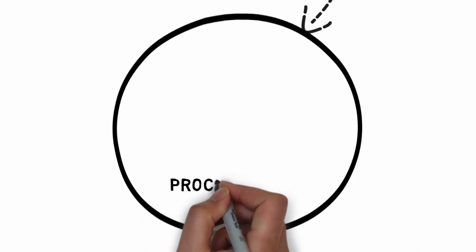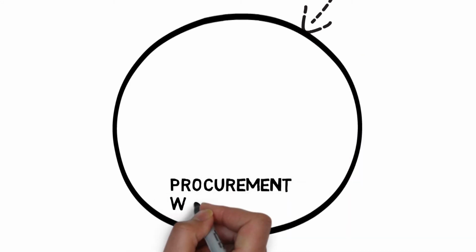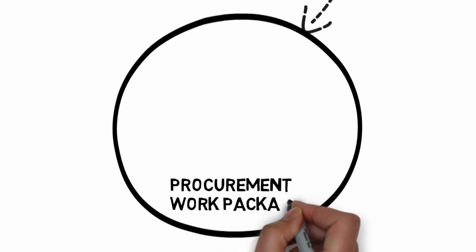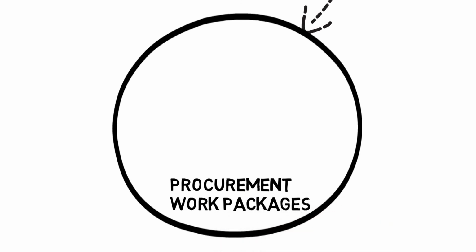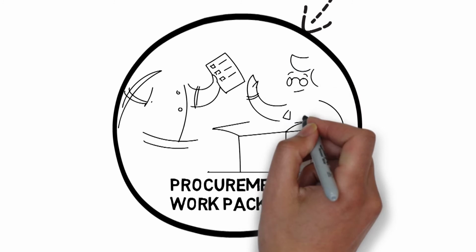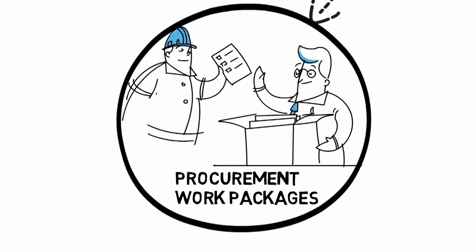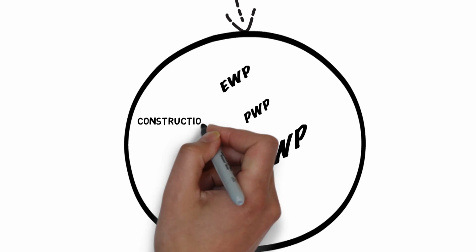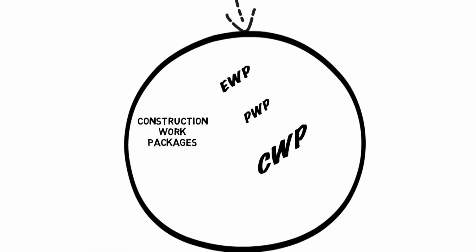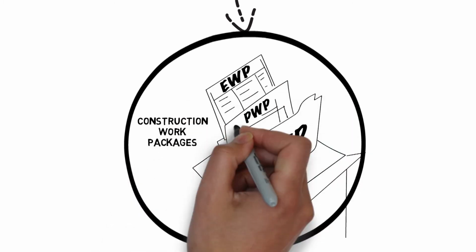The bill of materials from the engineering work packages is then used to develop fabrication and procurement packages, which, in turn, ensure that materials are fabricated and procured as complete packages, in the correct sequence. The creation and delivery of complete packages from engineering and procurement leads to the population of construction work packages with all of the drawings and materials required to execute the work.